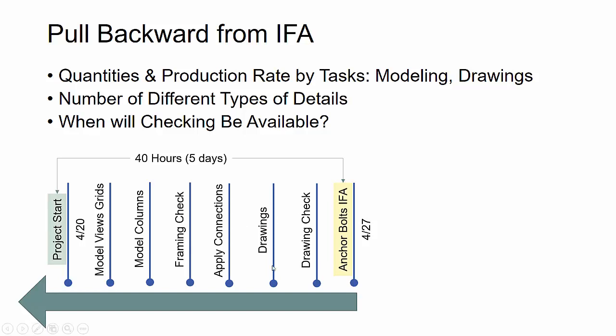The point I'm trying to make here that's really important is, again, I see a lot of detailers that get 2 weeks in on the job and halfway through this process, or even all the way to 3/4 and 1 or 2 days before the submittal, and they're in a slam and they can't make it, and they didn't see that it was going to happen to them. When you map backwards and give yourself the proper amount of time at the beginning to figure out what you need at these end steps and move backwards, you really are trying to identify problems early.